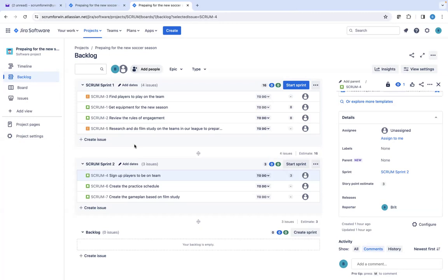From the 7 people, of course, you as the Scrum Master typically don't have any cards, any issues for yourself. So no cards for yourself. Product owner the same, unless they are acting as a developer, a hybrid type of role, but typically your product owner doesn't because they have other obligations. So usually 0 for your product owner as far as cards are concerned.